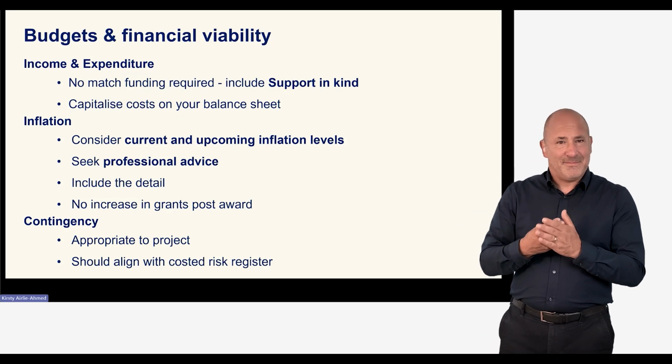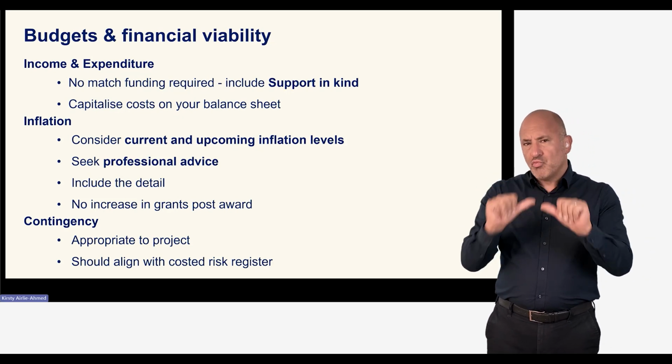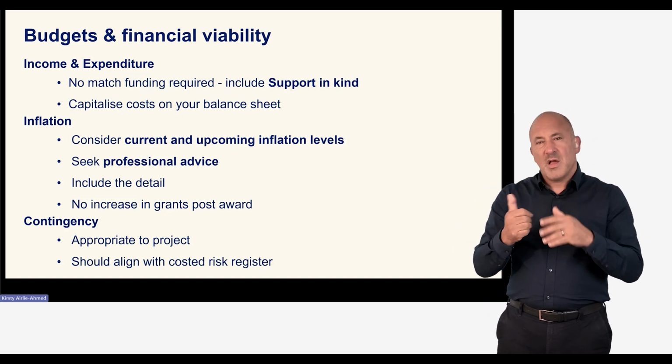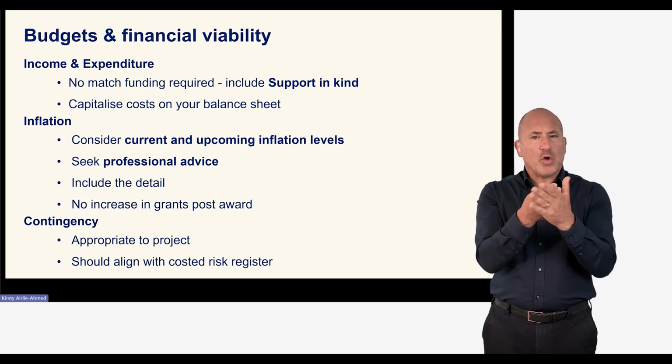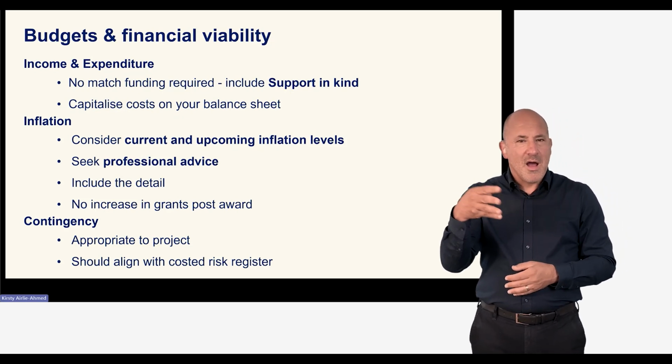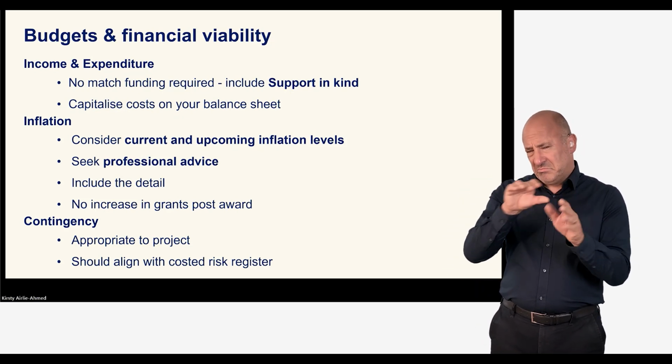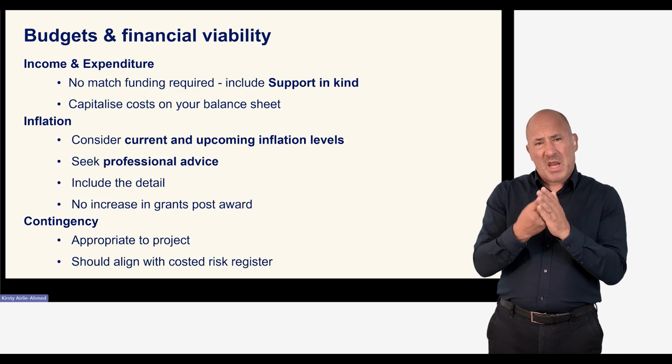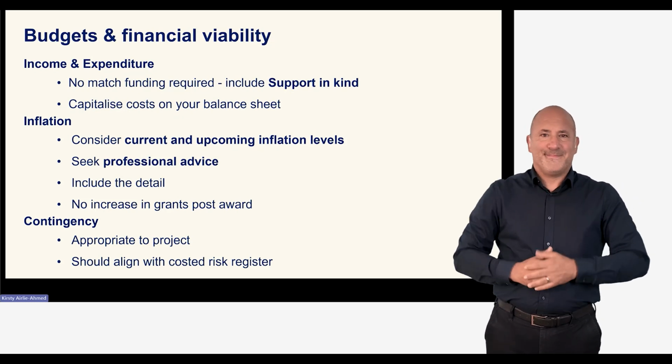Contingency. Your contingency should be appropriate to your project, and figures are expected to align with the costed risk register. Please ensure you include an appropriate contingency figure in your budget.